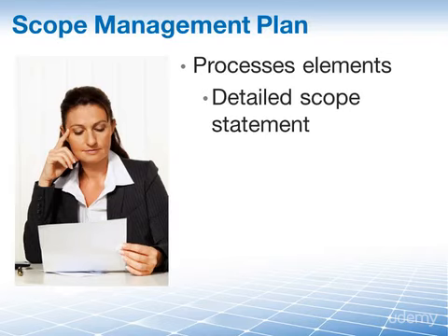And let's just be absolutely clear. The detailed scope statement is not part of our scope management plan. But in the scope management plan, we describe how we will later on develop that detailed scope statement. It's the same with the next item.